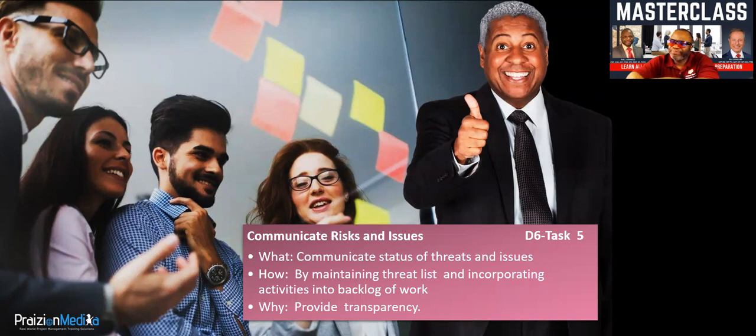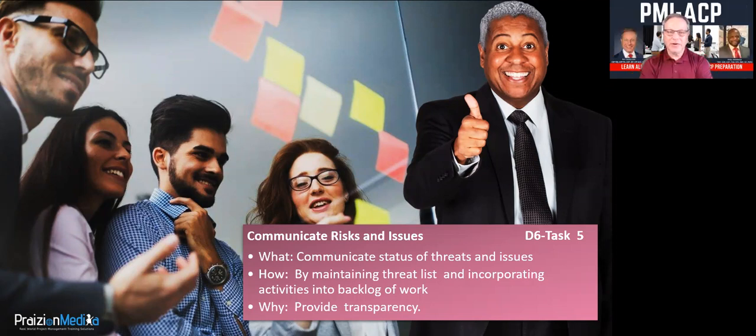But let's talk about the real world application of this thought, communicate risks and issues. Is this done in any particular event? Is this just on the information radiator? How does this work? Yeah, we want this to be in the radiators, meaning that this information is 24/7 available. I don't need to have a meeting for it. Anyone should be able to see it at all times. So if someone's interested in what risks exist, they can go to the tool and take a look at it immediately and get that information.